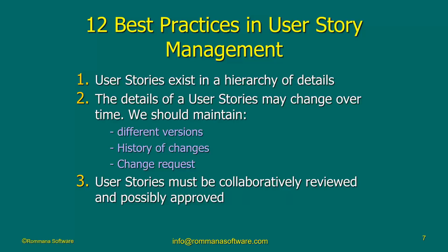Now, the concept of a change request has always existed in project management and requirement management for years. I don't understand why we forgot this when we did agile projects. If someone wants to make a major change to a user story to the point that it is going to change the scope of the user story, or affect the time this user story will be delivered, then a change request needs to be written. And that change request will be used to do one of two things: either to create a new version of an existing user story, or to simply create another user story.